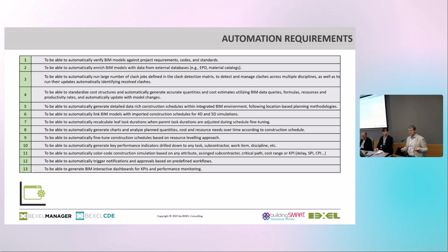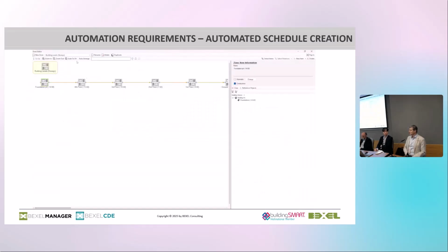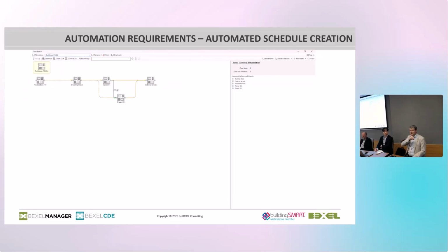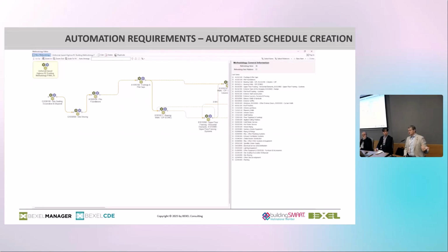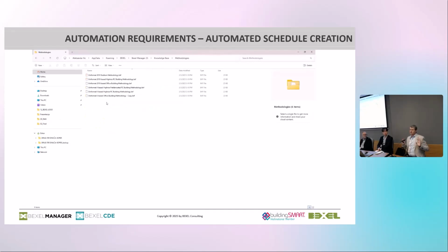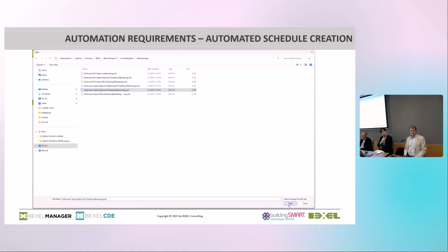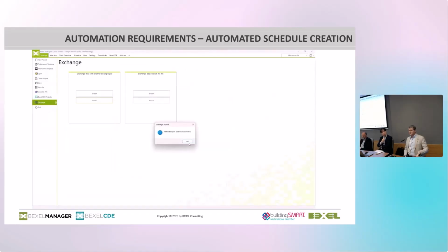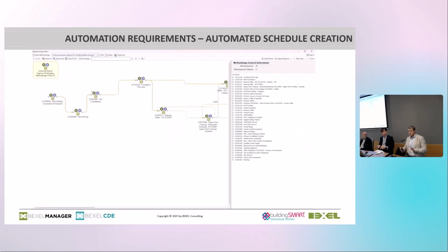And the same applies, I will show you now, in the planning process. This is, let's say, a very long or old video, but this is how in Bexcel you have similar office buildings, and you just load the template from a previous similar project, or your standardized template for an office building, from your knowledge base. And these are relationships, it's called that in the Bexcel methodology. And the system will automatically create, in this particular case, around 4,000 tasks, which is not too many.